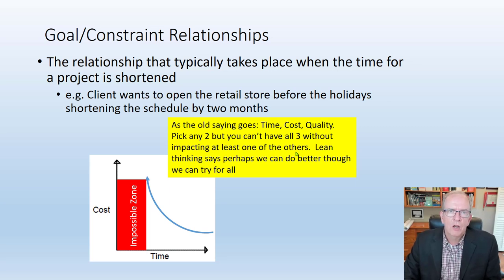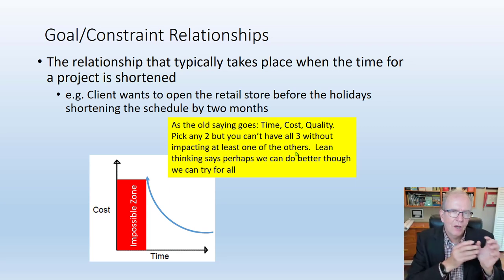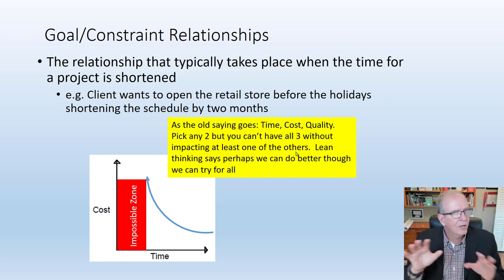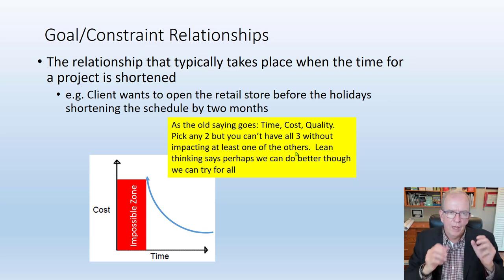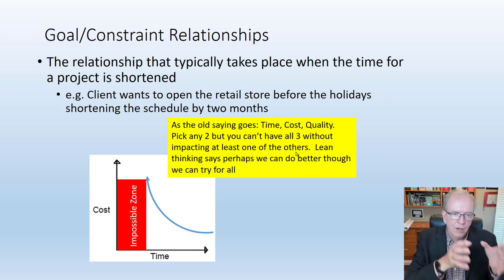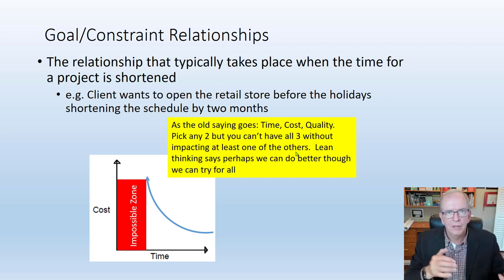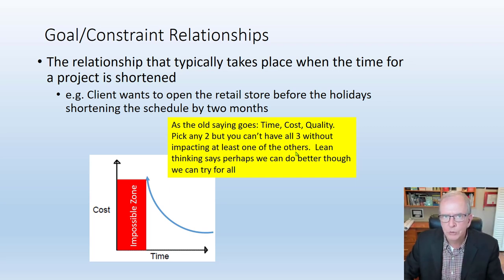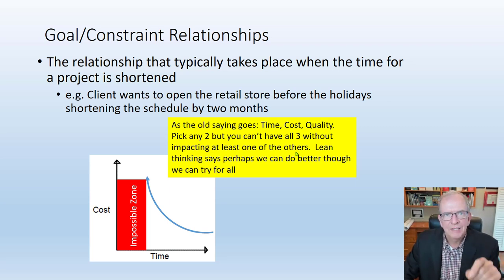Doing better to try to impact all three also involves changing the contract model that we're dealing with, so that it's not as adversarial — that the incentives are there for the team based on how the project does, not how individual trades do. Trades tend to optimize for themselves because the incentive is there for them. In a lump sum contract, they've got a total price that they put in, and if they can get in and get out, they can make a profit. If they take longer and they're held up and have to do rework, then they don't make a profit. So the incentives in a lump sum are there for individuals to optimize.